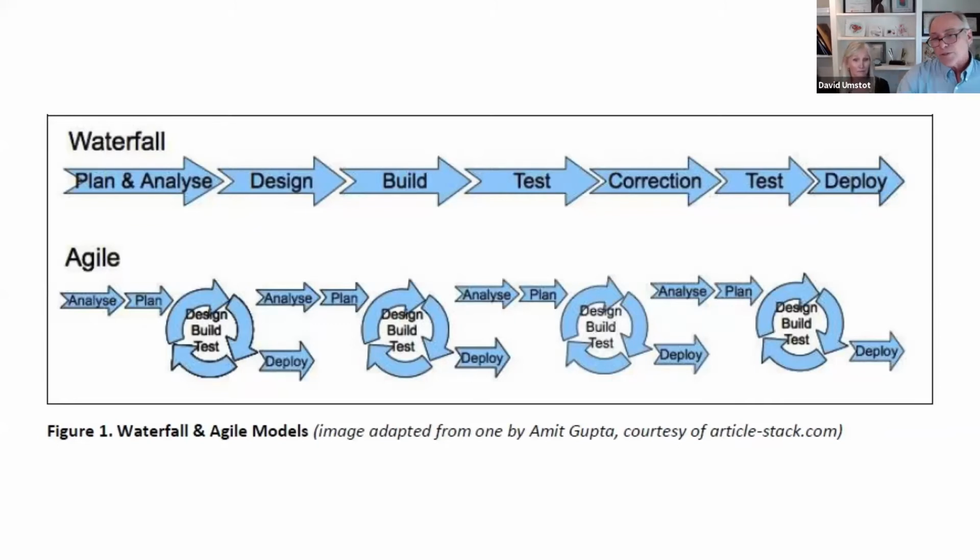So the lower series seems to work pretty well, particularly in a lean design context where you have cluster groups and are really trying to make decisions tied to what's in the best interest of the project as opposed to what's easiest for a particular discipline. And if something isn't right, you find out earlier in the design phase, and you can just start reworking it instead of waiting until you're so far down. Now making a change is really going to have a huge impact on the process and the project length.